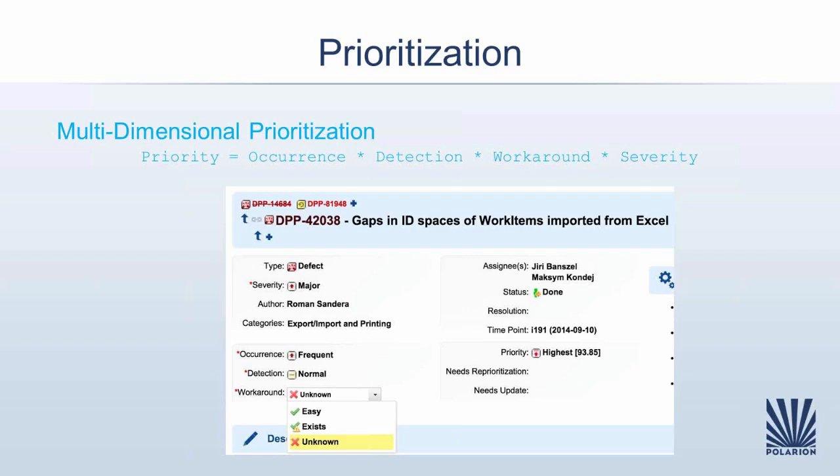At the end, the value stream of issues was well ordered. The issue priorities, the actual numbers, were very different from the priority numbers of features, and it would be quite difficult to align them. So the value stream budget planning process was used to plan the sprints, as we saw before. But it was nice to see that any time the issue was reported again, or when the issue was analyzed more, and detection or workaround was adjusted, the overall priority was changed. This followed very nicely the Agile and Lean principle to do as much work upfront as is actually needed and not more.